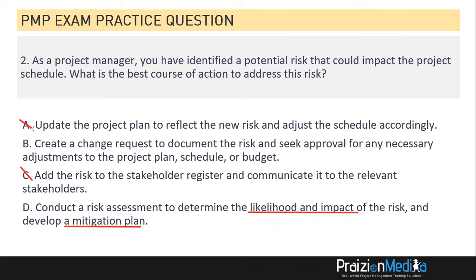Well, you don't need a change request to document a risk, right? You do need it to seek approval for any necessary adjustments, but you have to carry out an assessment to determine likelihood and impact. And then how about creating a plan that would take care of it, not being presumptuous about schedule, budget. It could be a number of things. So the best option based on what we have is D. Okay, D is the best.